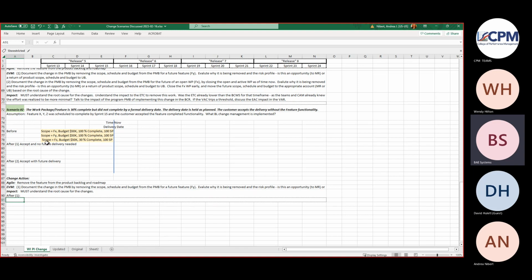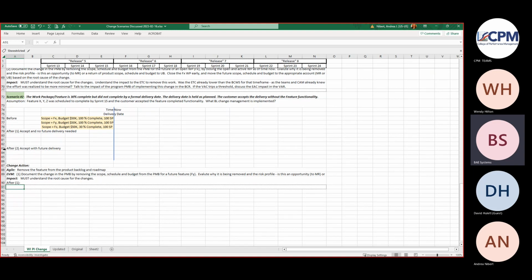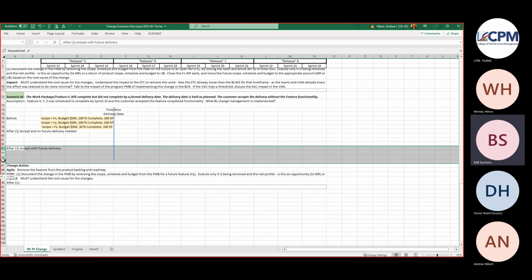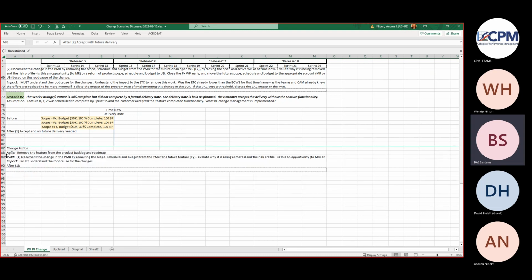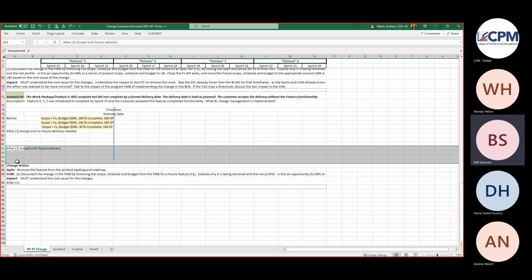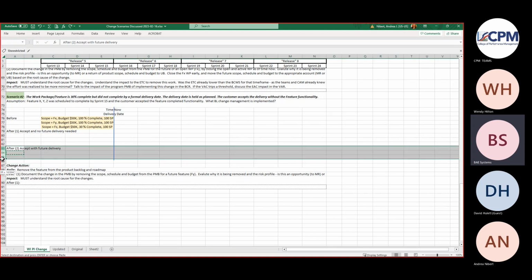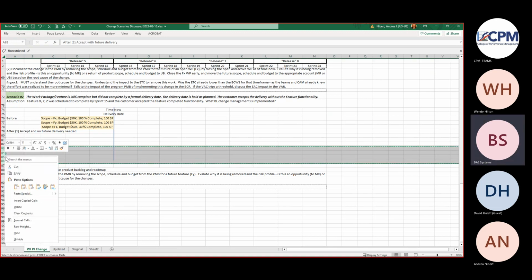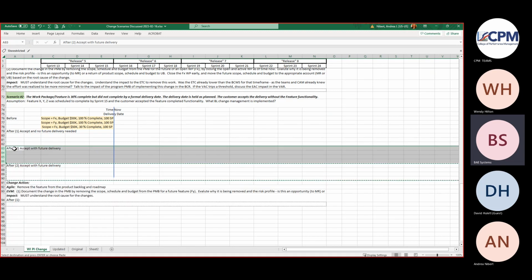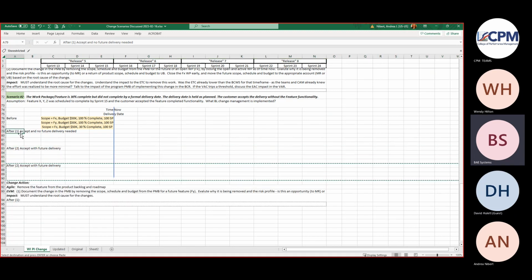Andrew, you're saying basically you still delivered the feature, but they said it was good enough. From a feature scope perspective, it wasn't maybe detailed down to the 55 tasks I needed to do underneath it. Therefore, if they're accepting the feature as fully functional, even if it was different than your original plan, then I think it makes sense that you would just have your positive cost variance.